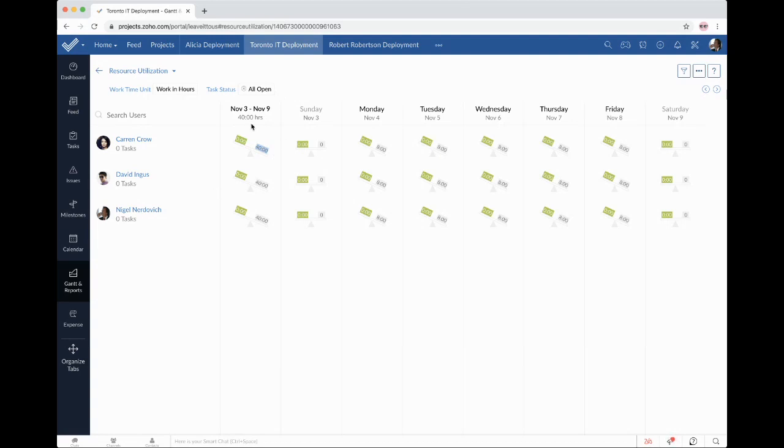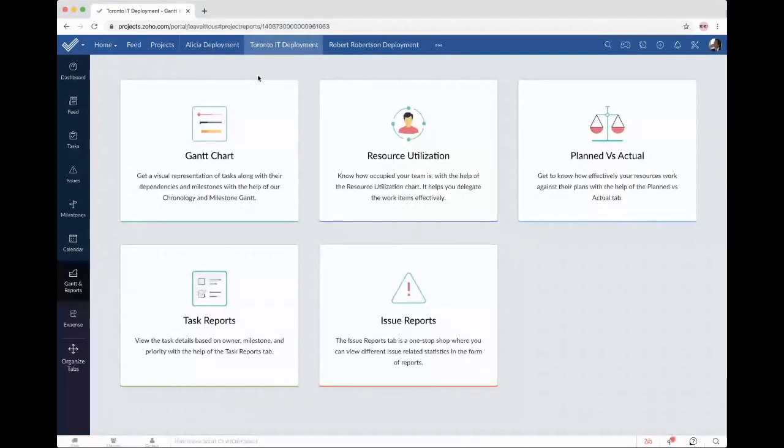So if I know Karen wants 40 hours this week and I haven't given her any, and I have to make a new task, I might give her those hours. You can really break it down like that. This can be really useful, especially during the holidays. Just in general, anytime when your company is really busy or really not busy, it's easy to unevenly pool labor. So it can be nice to come in here and check and be like, oh, I'm not giving Sarah any hours. Let's give her more of those.